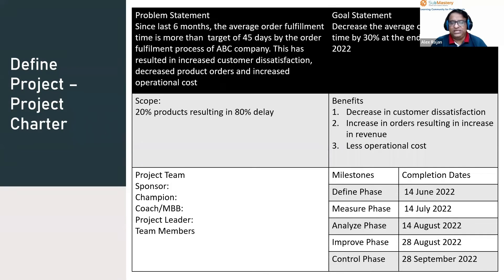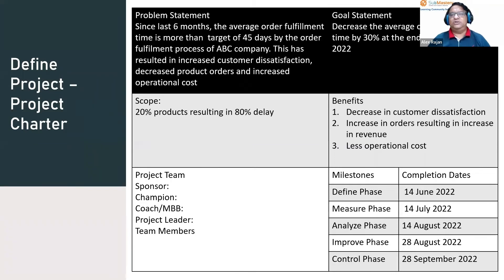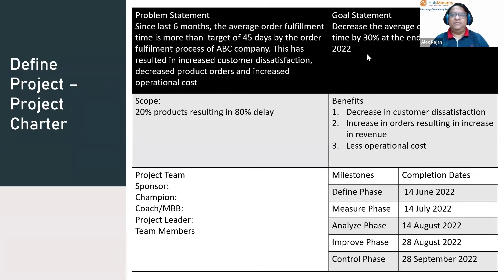In the goal statement, we define what the project team is going to achieve in the next four to six months. A Green Belt project is completed within four months and a Black Belt project is completed in six months. For this Green Belt project, we say: decrease the average order fulfillment time by 30% by the end of September 2022.